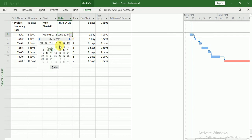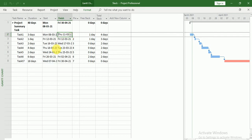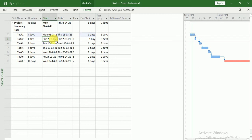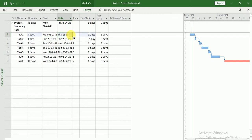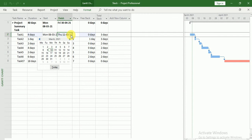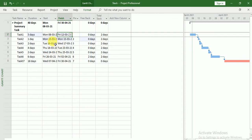Look, I will just set it to 11th of March. Now you can see Free Slack equals to zero and still our next task is not going to be delayed. But if I delay this task, then my next task will automatically change to Monday. So here you can see that my next task is going to be delayed because I am delaying my previous task.